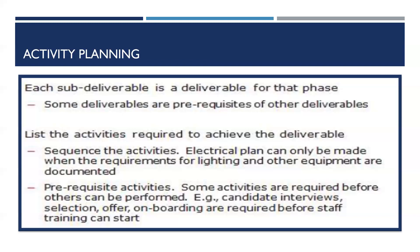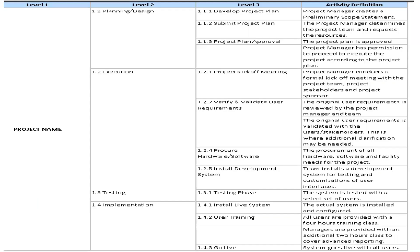From your broad deliverable, broken down into phases and sub-phases, identify your deliverables and decompose them into smaller activities. Then document them and determine estimations — how long each will take and how you will monitor and control them. Each activity has a deliverable, and some deliverables are prerequisites to the next activities.